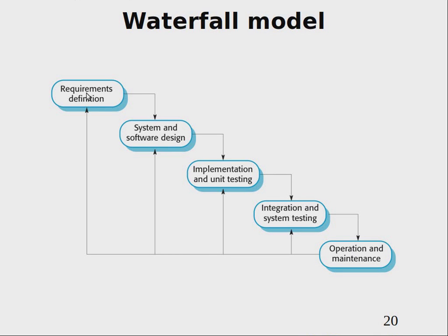Only when this activity is completely full with water, which means completely fulfilled, does the water go over to the next bucket, and then you start filling the next bucket under it, and then the next. So these dependency lines, how you go from activity to activity, are something like a waterfall. Because of this graphical representation, it is called the waterfall model.